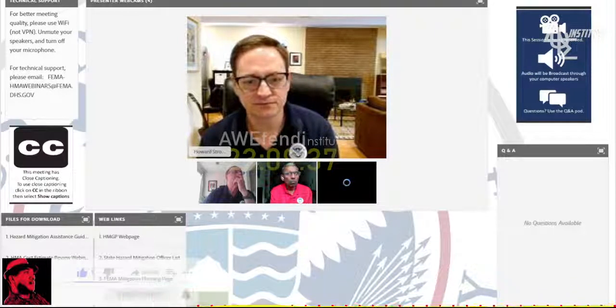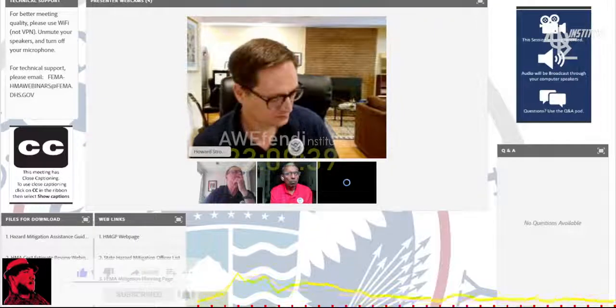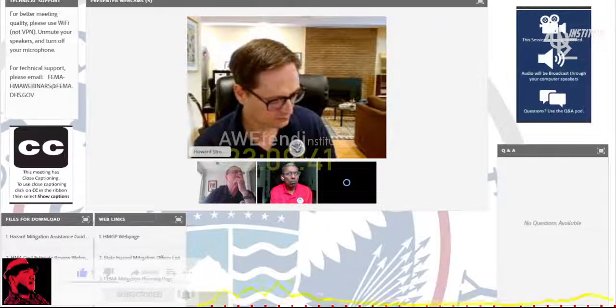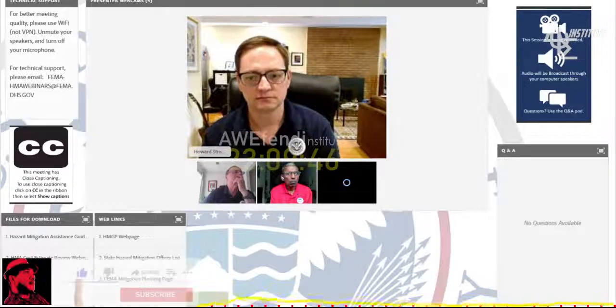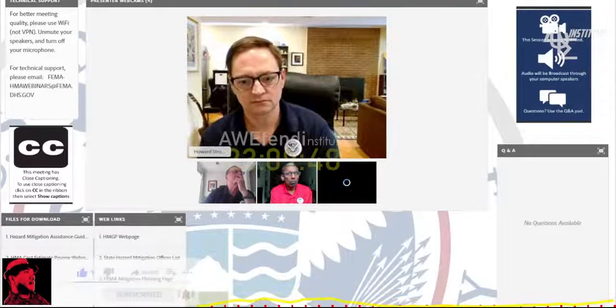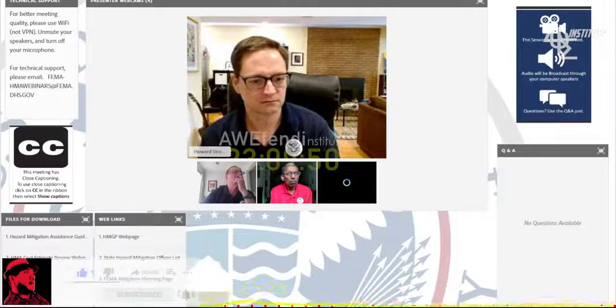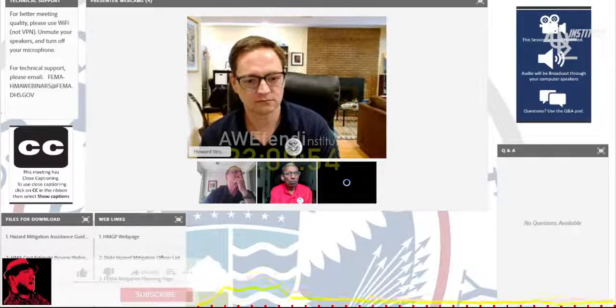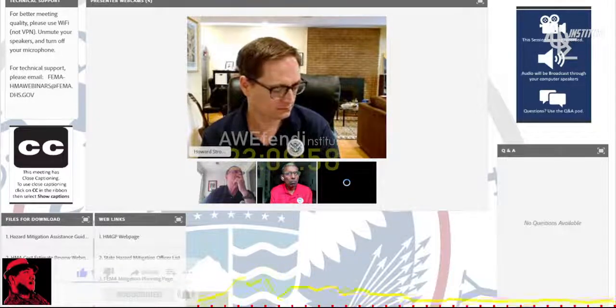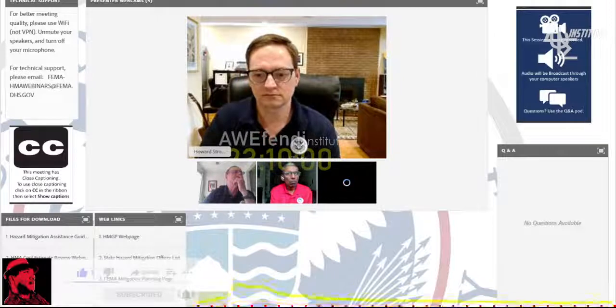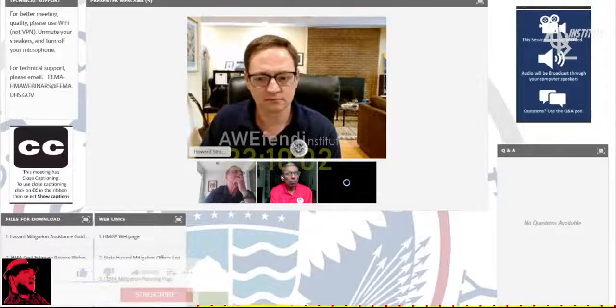Thanks, Howard. There are a number of ways to develop a cost estimate. First step is to clearly identify the scope of project. This is very, very important, and that's the major step, I would say. Unless you know exactly what you are going to do, then the cost estimate may be meaningless. So you need to include in the scope of work all the items needed to implement the project.